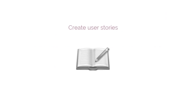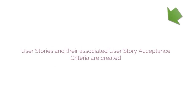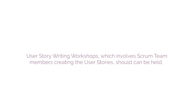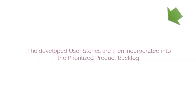The first process is Create User Stories. In this process, user stories and their associated user story acceptance criteria are created. User stories are usually written by the product owner and are designed to ensure that the customer's requirements are clearly depicted and can be fully understood by all stakeholders. User story writing workshops involving Scrum Team members can be held. The developed user stories are then incorporated into the prioritized product backlog.